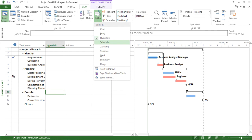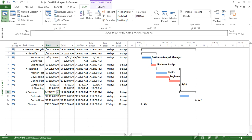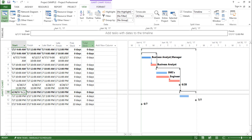Moving on to the schedule task. If I click on the schedule task, now you see the table has changed out here. Now I have the task mode, task name, start and finish by default. This time I have something as late start, late finish, free slack, and I can see the total slack as well.